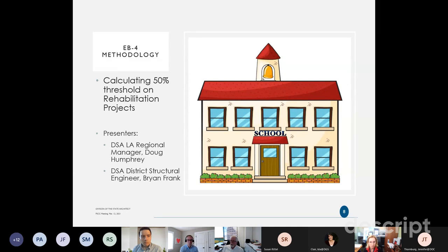So you would give us a project cost. And any building that probably looks like it might be in this category should probably have a pre-application with us. We come in and do an evaluation, talk about how the evaluation is, and determine whether all 4 buildings on this example or only one of them come in. The issue when you have multiple buildings on an application and one building crosses the 50% line or appears that it might, there needs to be separate accounting.